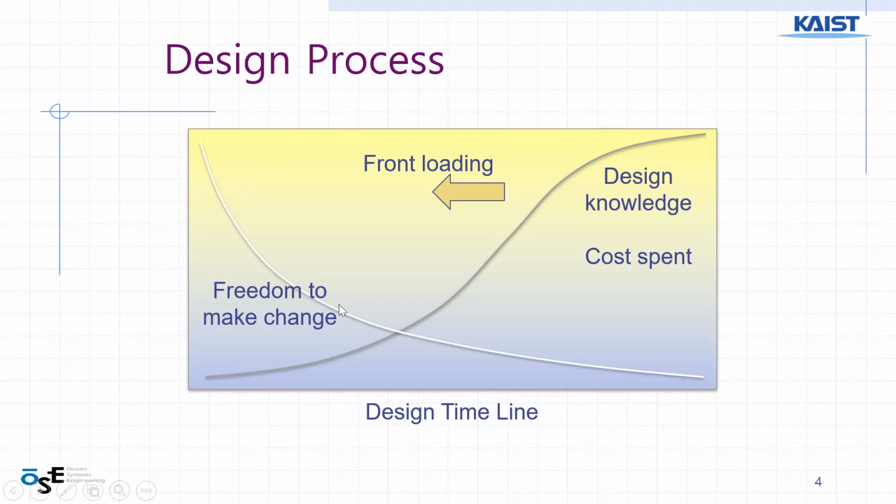But as time goes on, near the end of construction, it is not easy to change even small things. If you want to change something, it takes time and much money. That is the nature of design and construction of any item.